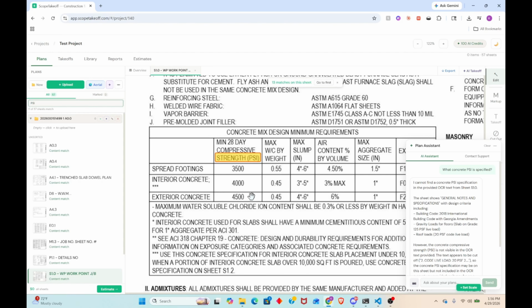What I typically do after that is use this markup tool to run a dimension. I usually try to find a longer dimension on here. So yeah, 106, that's good enough for me. I'm going to check this point here, check this point here, and make sure we're good. Yeah, we're good on the scale. So just to verify, a lot of times the scales on these plans may be wrong. If it was wrong, you could go ahead and do calibrate 2-point click.